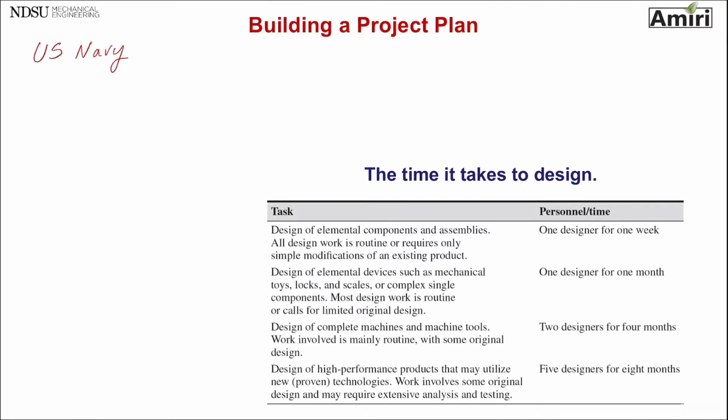That's a good way of estimating your task duration if you're not 100% sure. So it had time estimate, which was T sub E, (T sub A + 4 T sub M + T sub B) divided by 6.